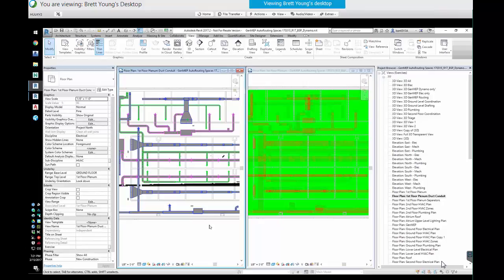We can give space up for MEP in the beginning when we know it's not going to be that complex later, possibly, right? We could let ceilings get higher because we know that area is not going to need it. Now, I know that's never going to happen, but... Well, and a contractor should price their work higher if it's highly congested. Right. And by the way, they can get the money back if that tick lowers soon. Right. Because if it's tightly congested, it's hard to do it.